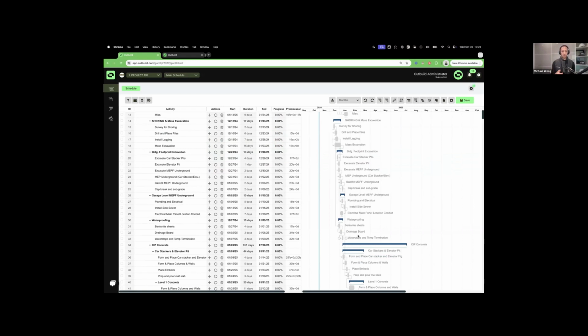What are the most important parts that we want to make sure we see? Most of the owners, when you ask them, and I was an owner for a couple of years, I want to know dry-in dates. I want to know patient day 1 in terms of a hospital or healthcare build. I want to know maybe some major MRI rooms when they're done so I can get the equipment in there. It's much more simplified than a lot of specifications dictate.